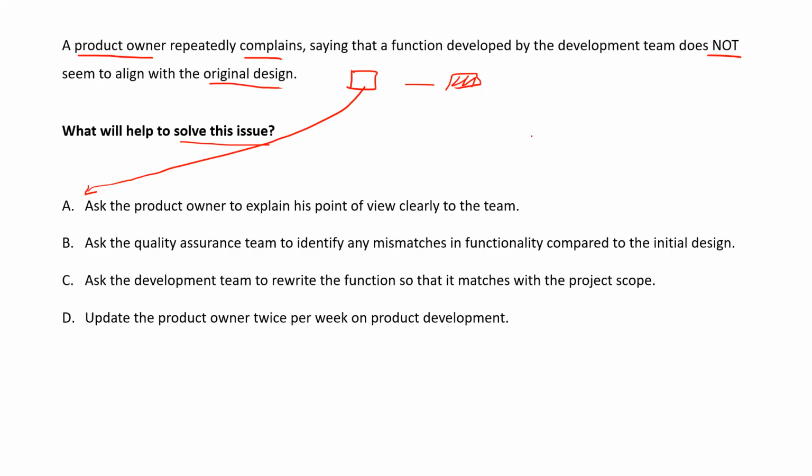Who checked the product? Is the product checked by the QA team, or the quality assurance team? Sorry, quality control. Who checked the product? I would say quality control, because quality is control. QA is done on the process while QC is performed on the product. So because of this word, this is gone, and this was already finished.